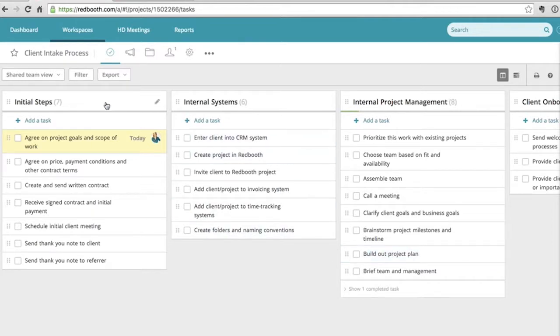And we're over here in this first column. You need to do things like nail down the specifics of the statement of work, get the payment terms, get the agreement signed. And this is pretty much the point where other people are starting to come into the process, besides the sales team or the executive. And this is where the handoff might begin to happen. So it's a common trouble spot.